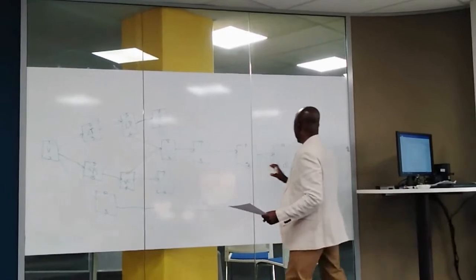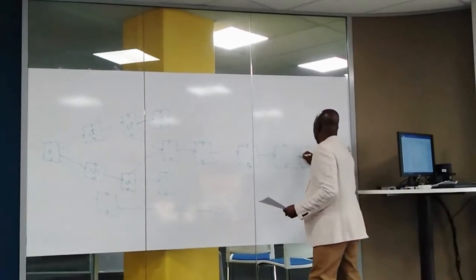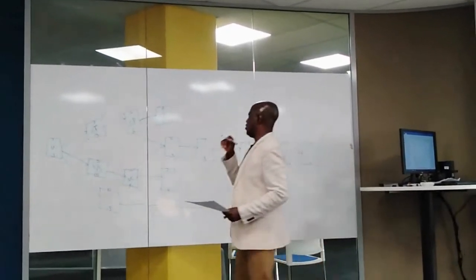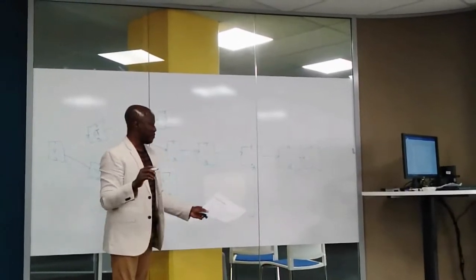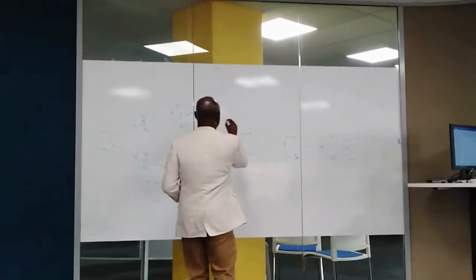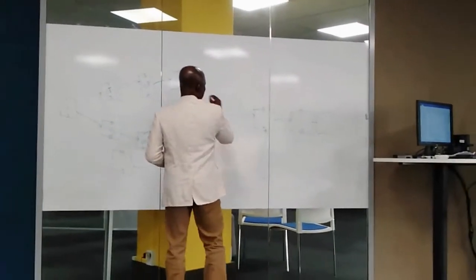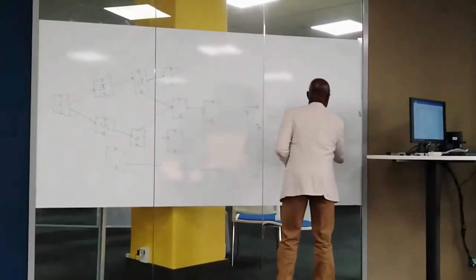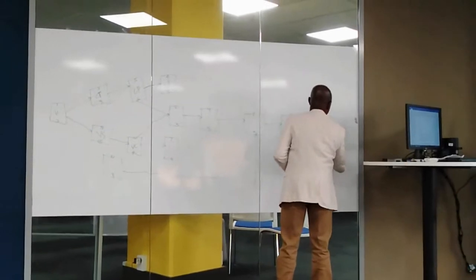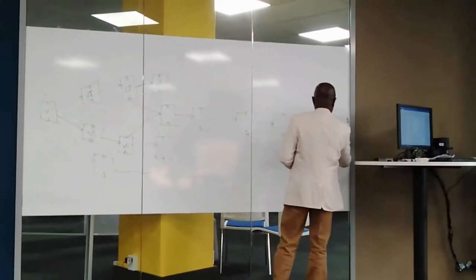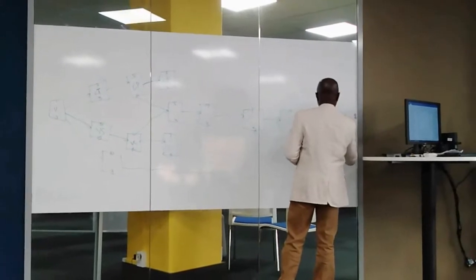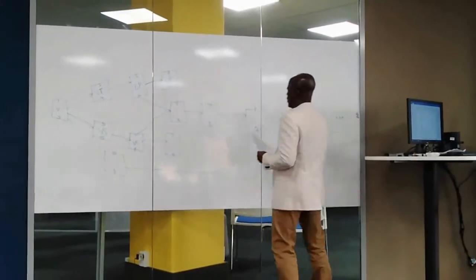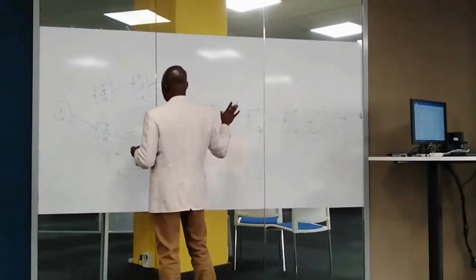Now, what are we going to join now? Everything is joined together from here to here, right? Yeah. But we need to draw something because the activity has to end somewhere. We create an activity here and say end day, just like we have a start here. When we calculate it, we will see it. But just let's leave it like that.